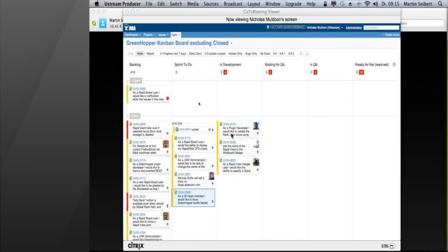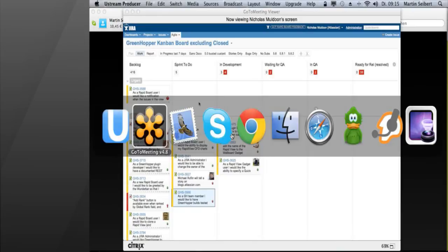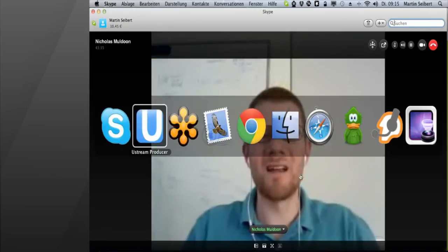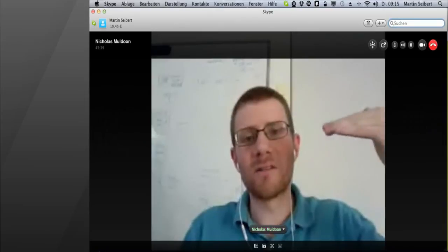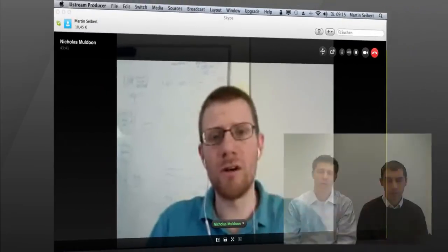But of course, I generally find, at least in Scrum teams, that they will generally have larger backlogs because they feel, hey, it's the great unwashed. They're untriaged, they're not scheduled for a sprint, so I can just leave it there, I don't need to care about it. But at the end of the day, it is waste. And if your customers ask for something, and it's not high enough priority to deal with straight away, you should close it off. Yeah.